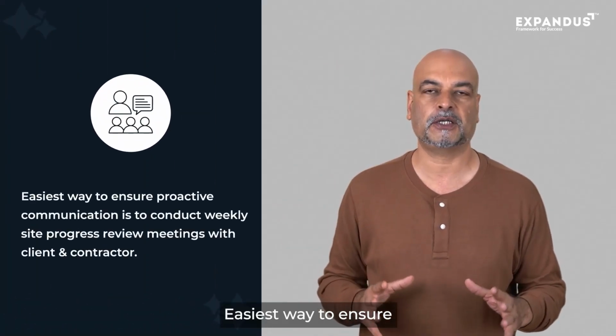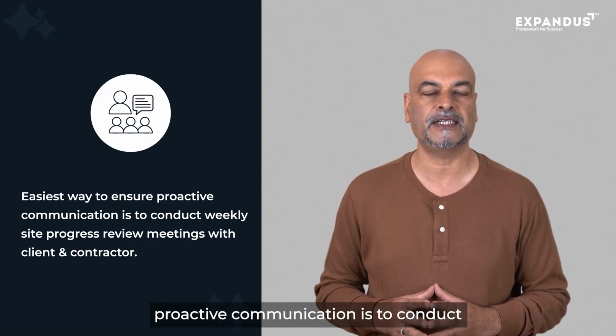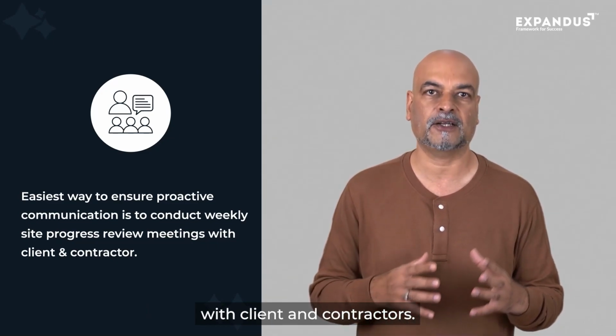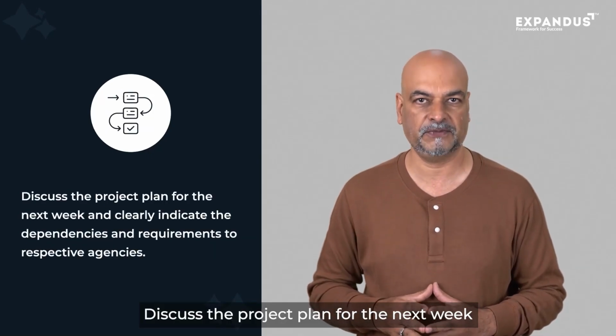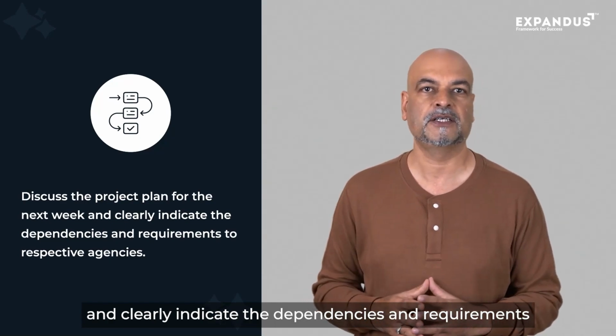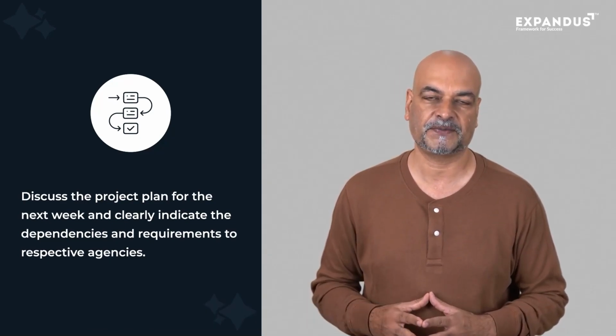The easiest way to ensure proactive communication is to conduct weekly site progress review meetings with client and contractors. Discuss the project plan for the next week and clearly indicate the dependencies and the requirements to the respective agencies.